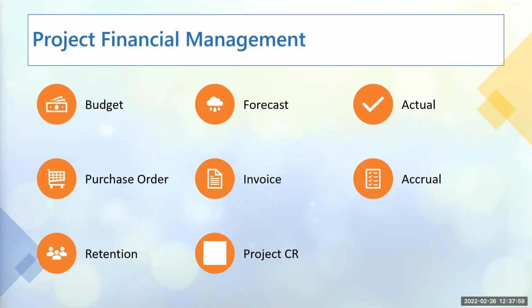A purchase order comes in after all of that has been done to help you and say, we are going to provide this amount of money for this project at this stage of the project. So most times you don't get the full PO for the project sometimes when the project is starting, when it's initiating. So they might break it and say, instead of us giving you the whole allocation for the project, we're going to give you this number of PO. This PO is going to cover this time frame or this milestone of the project.